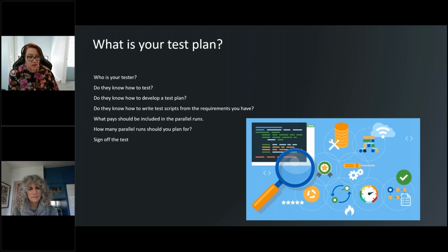We also do parallel runs, and you'll find most payroll vendors will do parallel runs. We always recommend a minimum of 2. Some organizations want to do 3 as the minimum. That's fine. And if for any reason those parallel runs don't pass the results, then we would always recommend doing another one rather than going ahead.